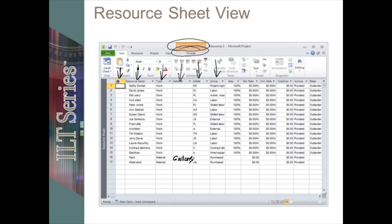We can add resources to groups so we can filter for groups — let's say everyone who's in project management, or everyone who's in labor, or anyone who's skilled labor — and we can sort and filter on those groups. One hundred percent means one unit, one hundred percent of their time. We also get a chance to put in the cost information. The accrue field is fairly important — accrue means that I can either pay the money out as soon as that resource starts on a task, I can say when they end the task, or prorated means you work a day, we take a day out of the budget.